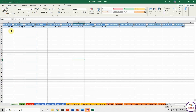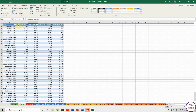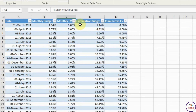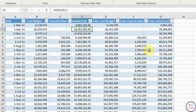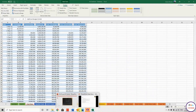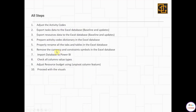For the summary tab, I enter basic project information manually. For the S-curve sheet, I have: date, monthly budget, monthly earned value, cumulative budget, and cumulative earned value. For the cost data sheet, I have: date, cost budget, earned value, actual cost, cumulative budget, cumulative earned value, and cumulative actual cost.